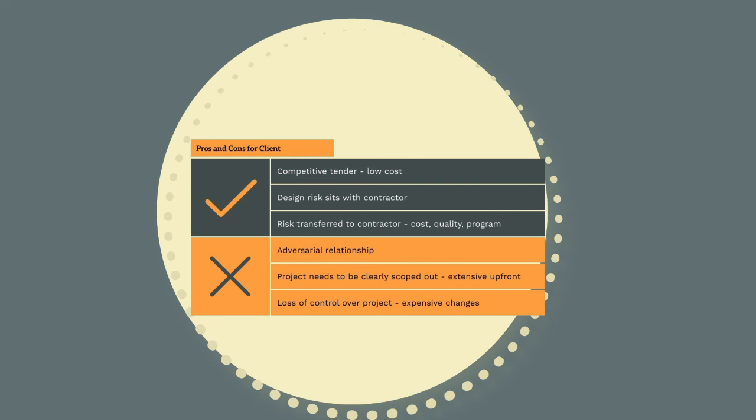So what are the cons? Well, similar to D&C projects, PPPs lead to adversarial relationships between the contractor and the client. Most PPPs end up in some sort of dispute. A significant part of it is differing interpretations of scope and expectations. In addition, such a huge amount of risk is passed on to the contractor that there is a significant chance that the contractor does not have enough contingency factored in and may lose money completing such a project. This will likely be incredibly difficult and lead to extensive disputes and delays.